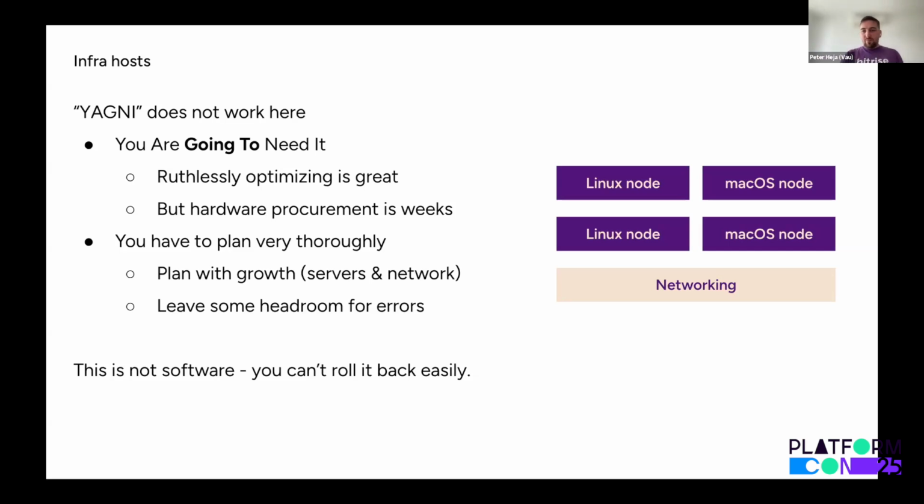And very important, and let me repeat that, hardware is not software. You can't roll it back easily. You might have every software, every configuration, source code managed, and you can have very nice automations. But with hardware, there are lead times and there is physical movement of hardware.